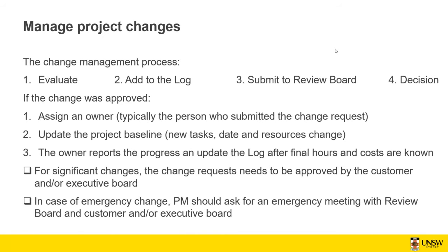This also needs to be looked through to see if this big change is going to be possible. If you have any emergency change, then it's the responsibility of the project manager to organize an emergency meeting with the review board and also the customer or executive board of that company in order to go through that change and see what would be the best option to take.